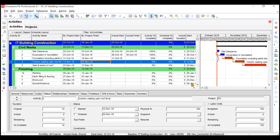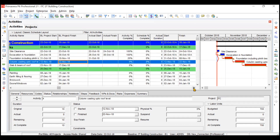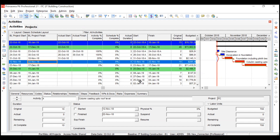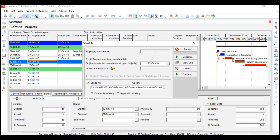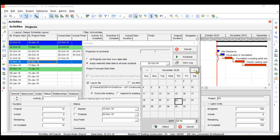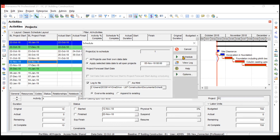Now it's time to schedule everything. You can see that future activity dates are currently showing 12th November, 23rd November, 8th January and so on. We will schedule with a data date of 5th November — we are not updating cost yet, just focusing on dates. Set the data date to 5th November and click Schedule.